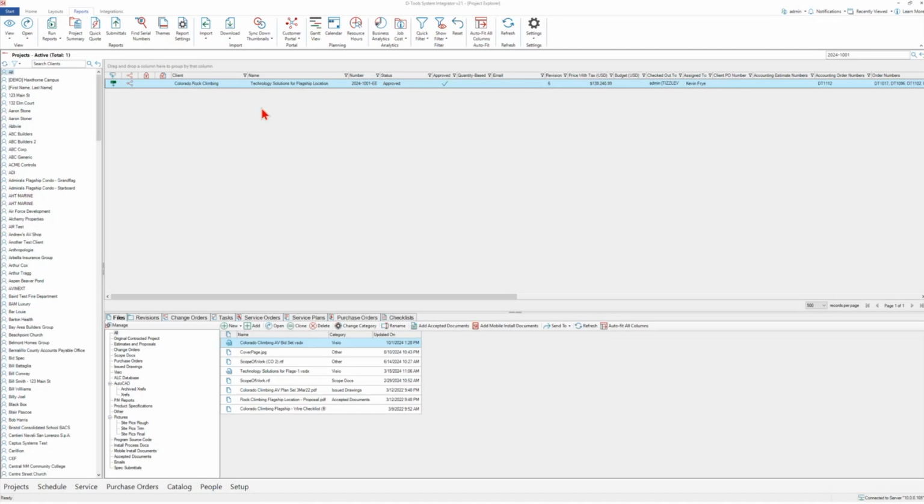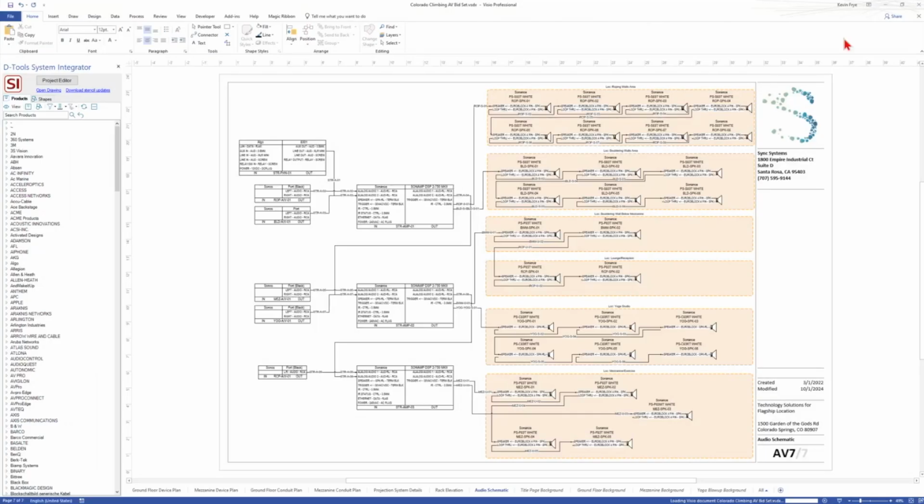Let me address that. So internal change orders, in general, the intent is that I am making changes that the customer is not asking for. And in general, we always want the price of that change order to be $0. So there is a feature built into the software, a setting that allows me to say that when I add items to an internal change order, make them non-billable. And if they're non-billable, the price will be $0. The challenge is that when you delete an item, you can't make the price $0. So if I have a part that's $100 with some labor and maybe it's $150, when I delete that on the internal change order, the value is negative. There is a feature in the software called placeholders. So at the stage where you approve the change order, you'll be able to save the negative value into what's called a placeholder, and that will zero out that change.